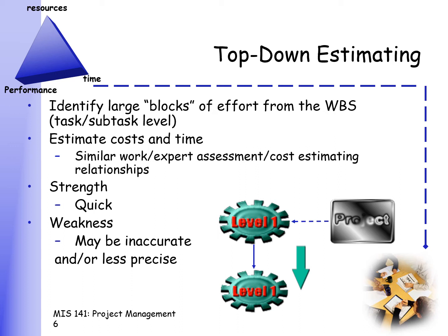The advantage of top-down estimation is that it's quick. The main disadvantage really is that it's inaccurate. But why do people use top-down estimations, and who uses top-down estimations? Well, top-down estimations are done by people who have had previous experiences or a lot of experiences with a certain type of project that they are going to be executing.